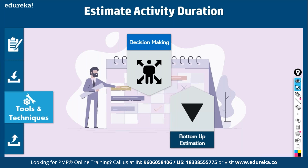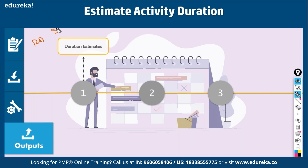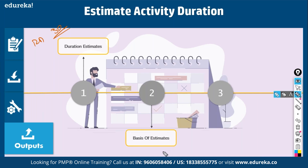Decision-making is also a tool — work package managers meet the project manager to settle timelines. Bottom-up estimating is where you know the actual detailed information at the activity level and work it upward to the work package level. The output is duration estimates for each activity — for example, requirement documentation as one work package will take 30 days. You also produce a basis of estimate, which is an important document justifying how you arrived at the 30-day estimate.